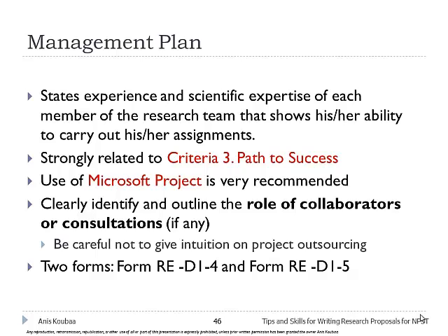You have to clearly identify and outline the role of collaborators or consultants. Be careful not to give the impression of project outsourcing. So don't say I will rely too much on collaborators or external consultants, because in this case it's like the project will be done outside. But you have to specify what is the contribution of the consultant, why you need the consultant. And it should be a limited percentage, maybe 20% or 15% of the human resource contribution to the project.